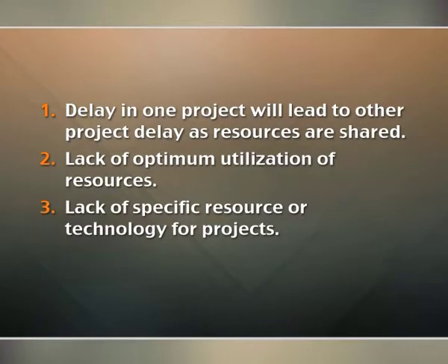Hence, project selection is an important aspect of project management, where the process involves evaluating individual projects and then choosing to implement some set of them so that organizational goals are achieved. Choosing a set of projects is a difficult task. Reasons for failure are high due to the following reasons. First, delay in one project will lead to delay in other projects as resources are shared. Second, lack of optimum utilization of resources. Third, lack of specific resources or technology for projects.